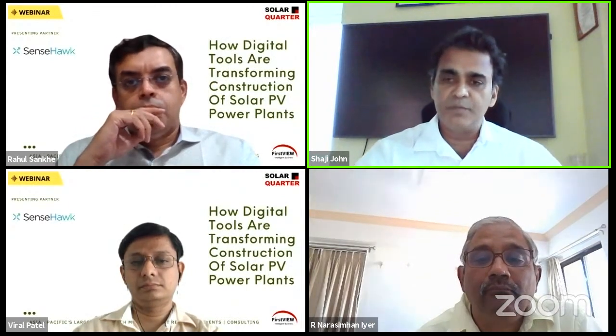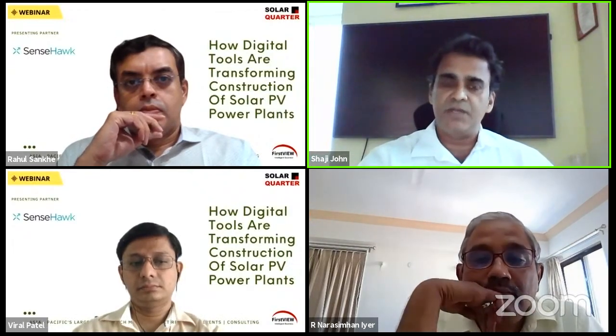Second is we are using drone-based surveys, especially for bidding purposes. We are mostly trying to do that so that we understand the site very well and take care of all site-related inputs while we are doing the costing and making proposals to our clients. That is the second digital work we are doing.